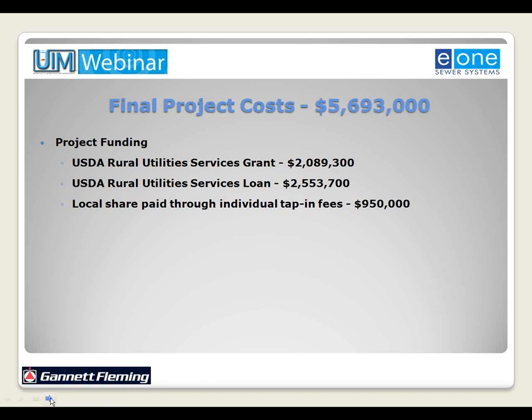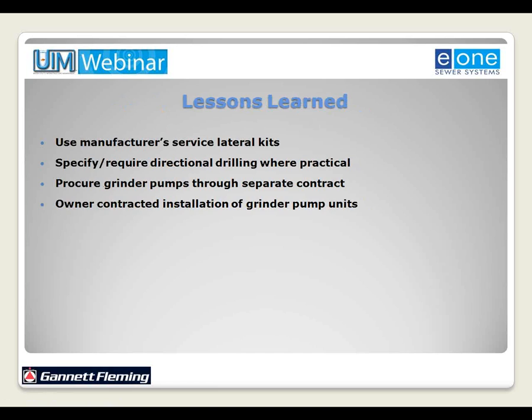Lessons learned. Some of the things that we did learn on this particular project: Gana Fleming and myself specifically had done pressure sewer projects in the past, but honestly never to the magnitude of 500 individual grinder pumps. One of the things that we do now moving forward, and would recommend to anyone considering this type of sewage collection system, is use the pump manufacturer's service lateral kits. Almost all the pump manufacturers will make a service lateral kit, which consists of a plug valve, a check valve, the compression fittings, and the valve box for the contractor's installation, where the separation is between the authority's maintenance and the private service lateral connection to the grinder pump.